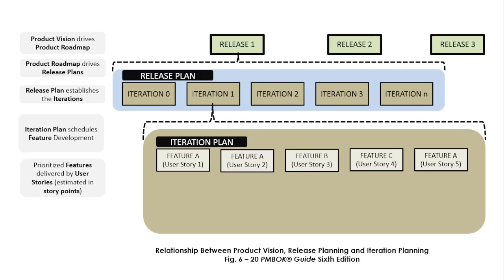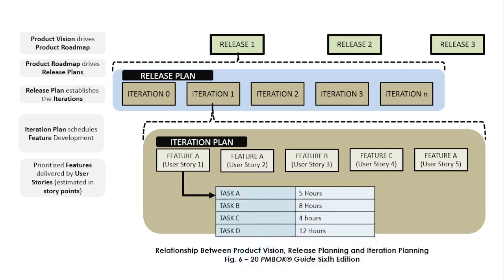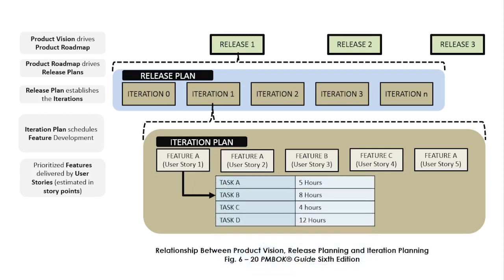Under that level, this is where we begin talking about the individualized work that team members do, because not everyone needs to decompose their work into hours or into tasks. So user stories are more prevalent in the world of Agile, and for that reason, you very rarely see this next component in mature teams that have already counted in their heads whether they can complete that work within an iteration. But some people still go down to the task level, but a lot of teams don't.